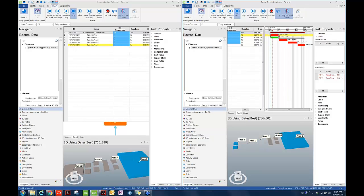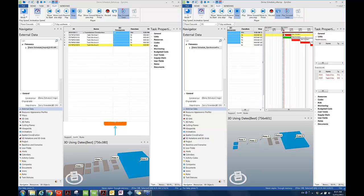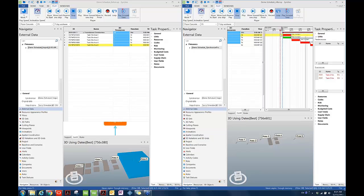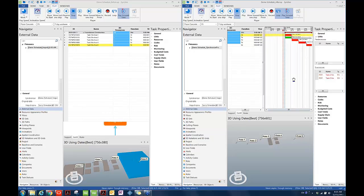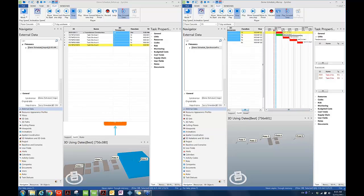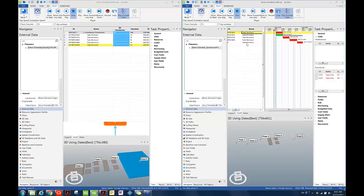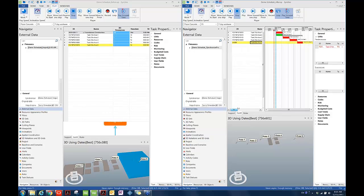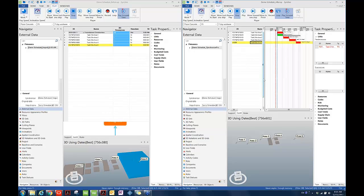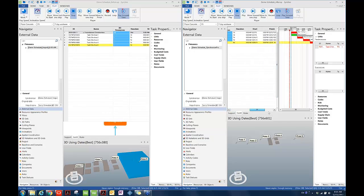However, we are able to tell that three resource assignments to the original task 4 has been lost. That is because the original task 4 has been deleted. Also, you will be able to see the new task, which is task 6 for area 4, has been successfully added and imported, synchronized into Synchro. And then that task has a different ID.